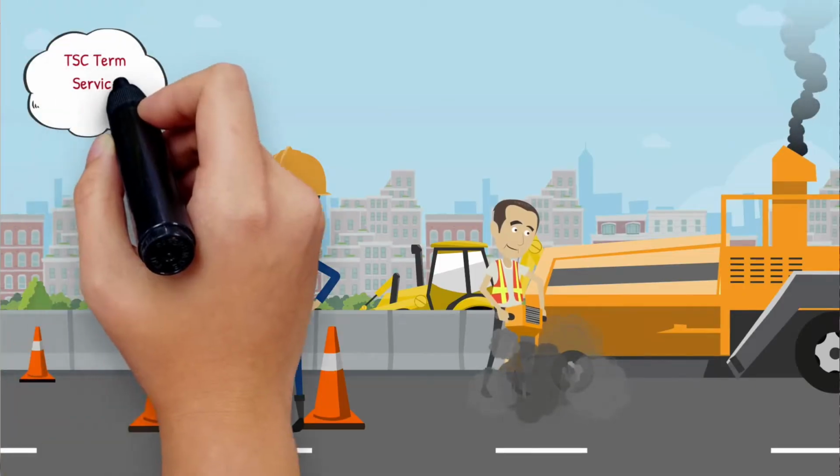If you are appointing someone based on their professional status, you will use the professional services contract. So now in the NEC 4, they also have the professional services short contract, right? So for those simple small projects or simple and small requirements, you can choose to use the professional services contract, which is the short contract instead of the main PSC contract that we are aware of, right?